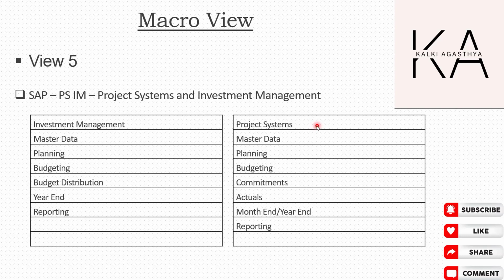And it can run across fiscal years, and capital budgets are typically set into three stages. One is budgeted at first, then it gets approved at the second level, and at the third level the forecast will be done. And cost can be controlled in PS by starting from a baseline cost and recording changes as and when they occur. Finally, in SAP, project costs are incurred on the income statement, and at the month end, the capital costs are transferred to the balance sheet into asset under constructions, which we call it as AUC. This process is called as settlement. So that is with respect to the project system.